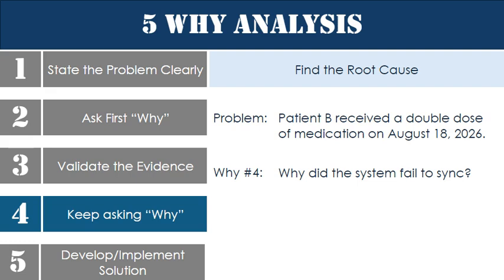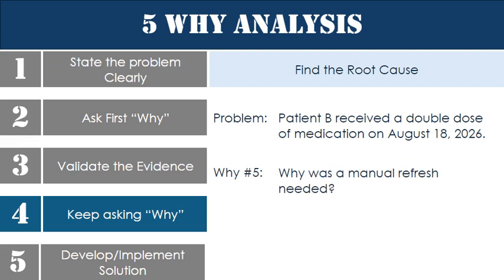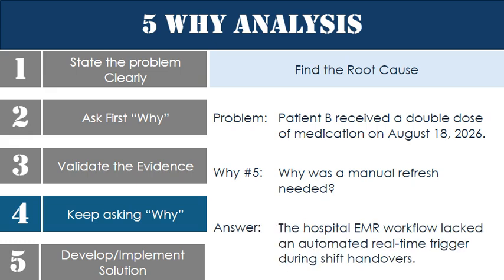Why 4. Why did the system fail to sync? Answer. The shift change data transfer script experienced a lag and required a manual refresh. And why 5. Why was a manual refresh needed? Now we are getting to the root cause. The hospital electronic medical record workflow lacked an automated real-time trigger during shift handovers.